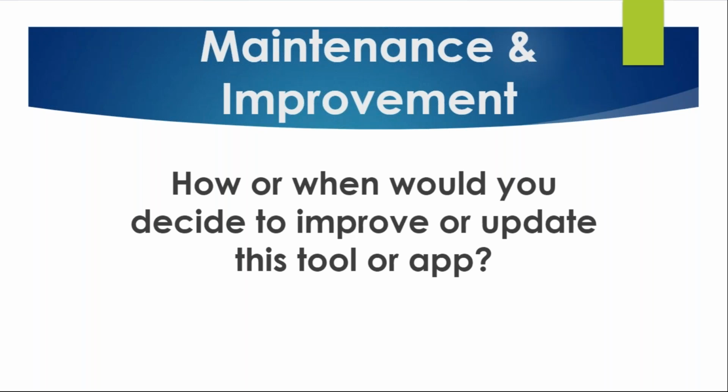For us, it's the quarterly release schedule. We have never had a release where there wasn't something that needed to be done on the applications. And so what we normally do is decide how much we're going to do, depending on what's happening. So if there's a major JavaScript update that needs to occur with Esri's tool set to allow us to do something, or something has been deprecated, we'll go through that sort of maintenance phase. If the work from the business side is light for that release, if the business work is heavy, we'll then schedule that in an additional quarter. But yeah, pretty much there's always a request from our business partners to get something new in the applications.